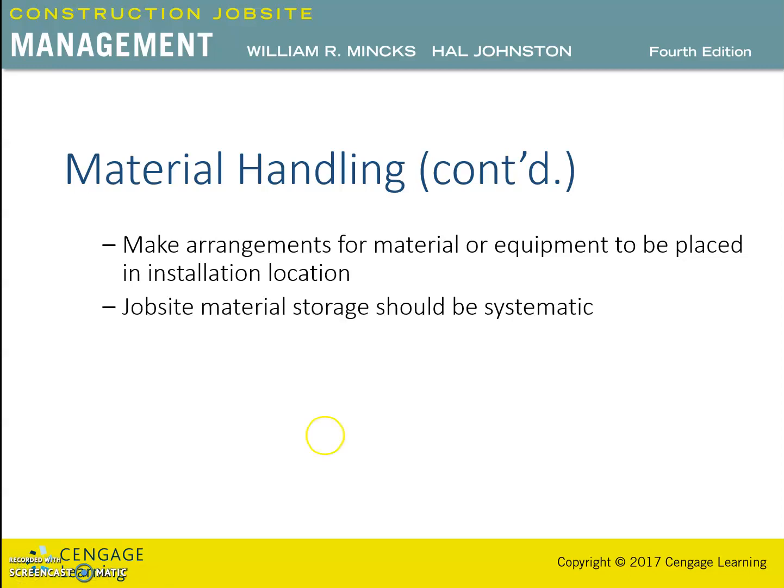Storage of material on the job site should be systematic. Most on-site storage areas are fairly small, requiring consolidation of material. The storage of material should be organized in a manner that is accessible. Deliveries are not necessarily made in sequential order for the material needed. An effective, well-organized storage area requires knowledge of the construction schedule and of the materials used for construction.